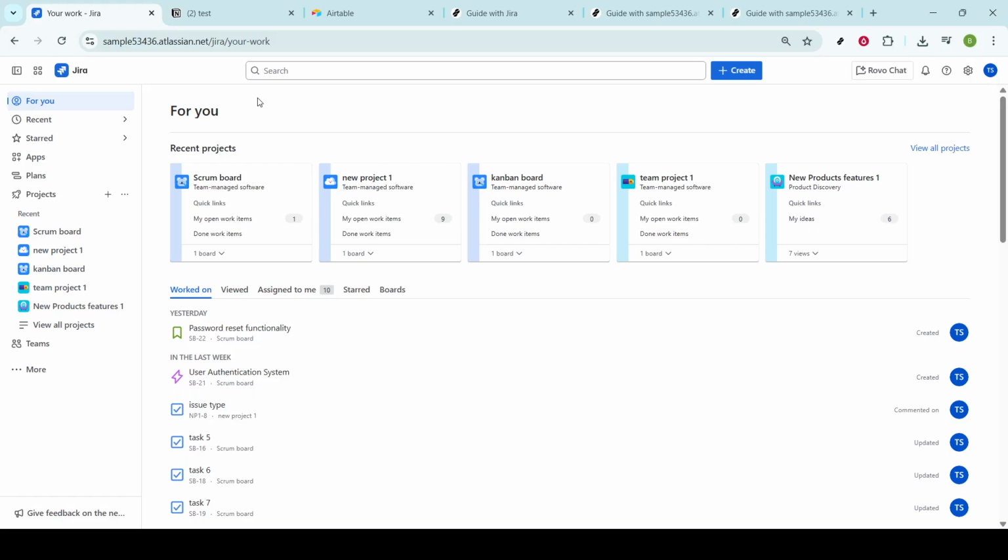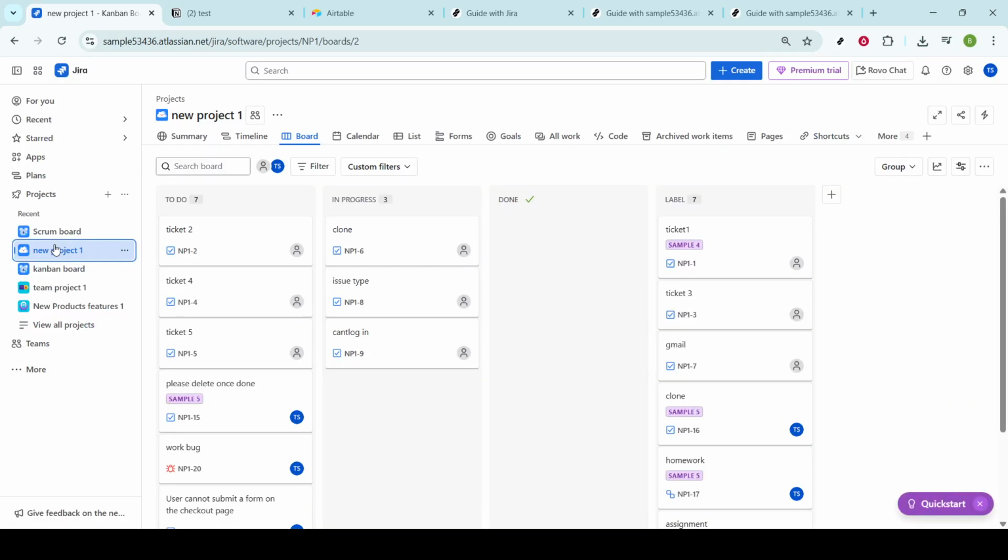The organization and data accuracy in your Excel sheet will directly impact the success of your import into Jira. It's important to ensure that your Excel sheet includes key columns necessary for proper mapping. These columns should include summary, issue type, project key, description, priority, assignee, and labels. This setup helps Jira recognize and categorize your issues correctly once they are imported. Take the time to double-check that all these columns are formatted correctly before moving on.